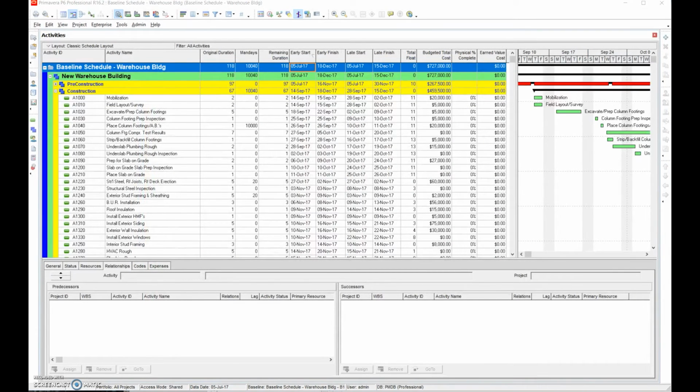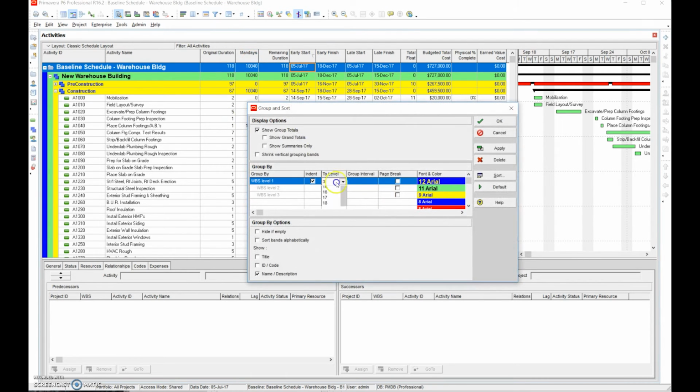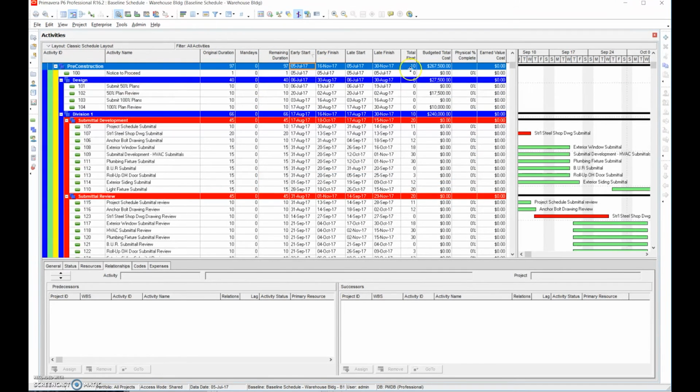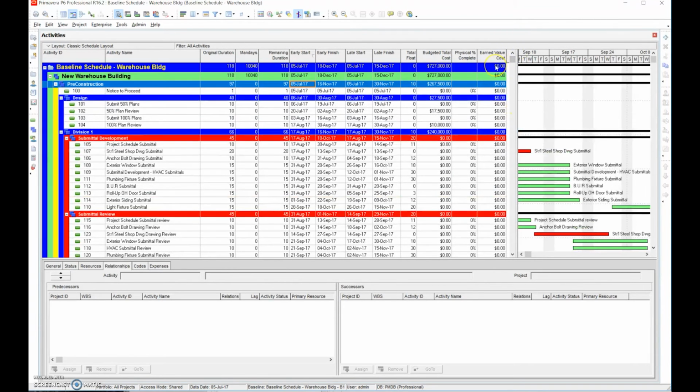Okay, so beyond continuous flow, I've shown you the banded chart. This is called a banded Gantt, where we have all the tasks shown at all WBS levels. We have a banded Gantt chart where everything's banded by summary task. We've done a continuous flow, where we got rid of some WBSs to show a continuous flow of activities between CSI divisions, basically by removing some WBSs.